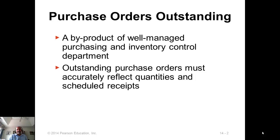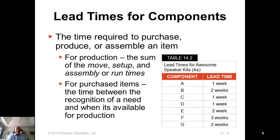The fifth component is the lead time. If it is a vendor order, it is the time between you placing the order and the order coming in. If it is a production order, it is the sum of all the wait time, cycle time, production time, and everything included — the time between placing the order with the shop floor and when the order is completed and stock is made available.